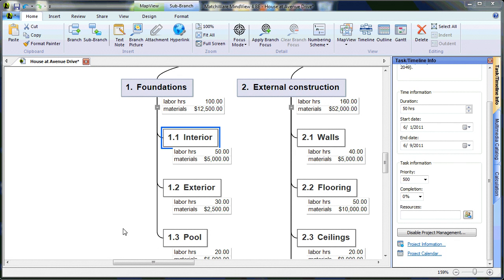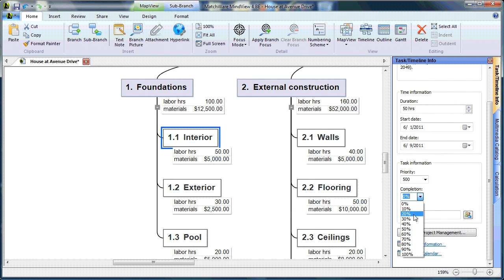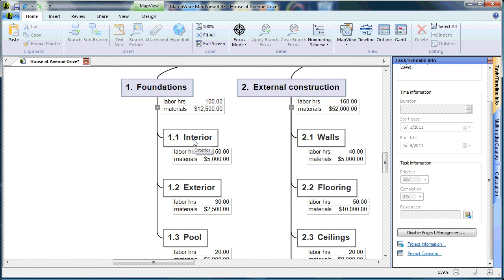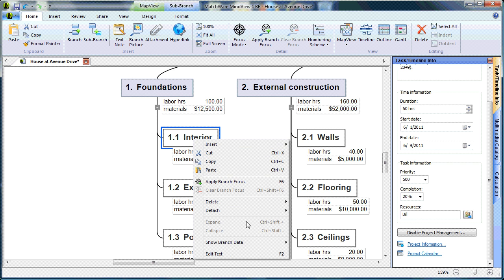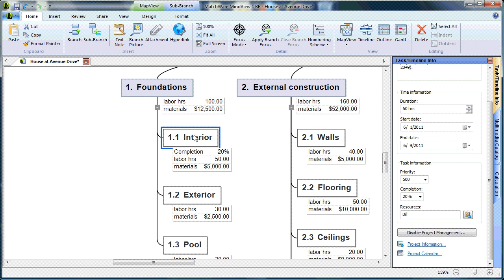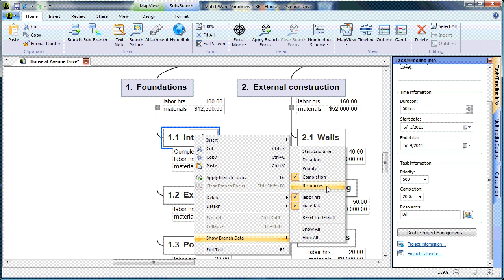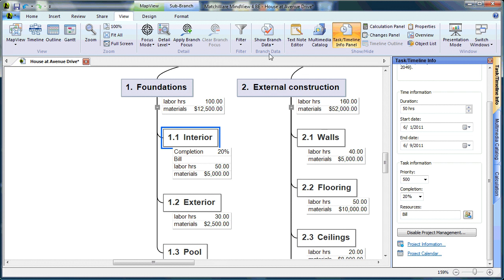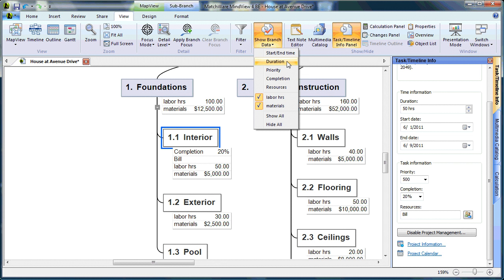If you'd like to display completion levels, start dates, and resources, simply select the desired branch or stage, open the Task and Timeline Info panel, enter the duration, any completion levels, and any resource names that would complete that task. To display that information on the branch, simply right-click the desired branch, choose Show Branch Data, and turn on your specific data points — in this case, completion and resource. To turn these on for all branches at once, choose the View tab and Show Branch Data.